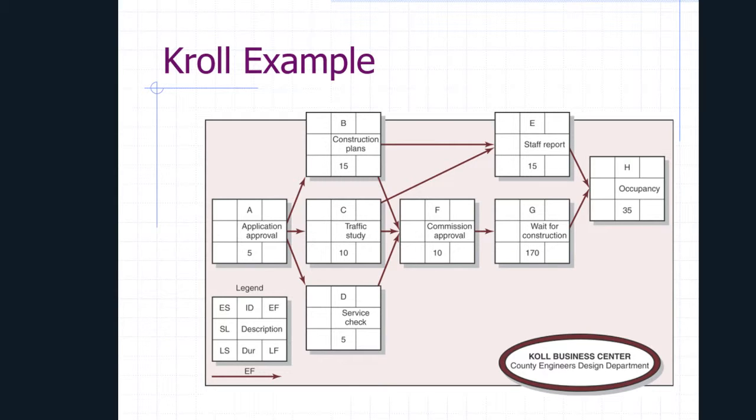You can see the little bit of text is still there, slightly smaller box for it to go in, but it's still there. And then you can see directly below the ID on the bottom line, you've got the duration. Now this example, I'm not going to worry too much about it, but you need to actually specify this, as I said earlier. Is this hours, weeks, days, months, whatever? You need to make sure that you understand what that number represents.